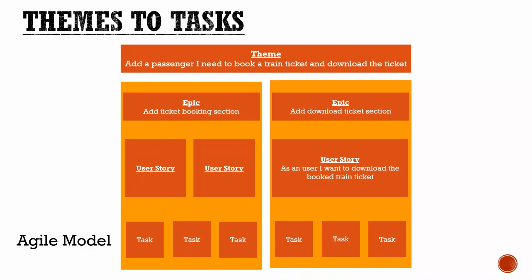So we break that story into subtasks. What are the things required for the download? We can have a print option, like after download we can print, or something like that. We can cancel print if download is happening. If download is not happening, we can refresh. We can have many tasks for the user story. So these are all the examples of theme, epic, user story, and task.